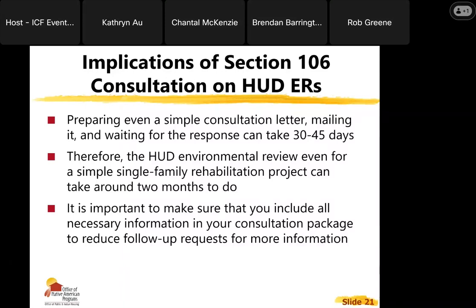And it's important that you make sure you include all of the necessary information in your consultation package so that you reduce follow-up requests for more information, to not have that 30-day clock keep resetting, but just have that 30-day clock once.